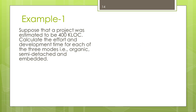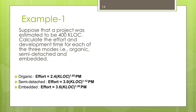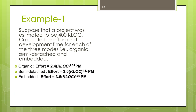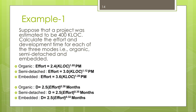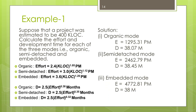With the help of this example we can understand how to use the COCOMO model for finding the effort and development time. First, find the expressions for effort and development time for all modes. These are the effort expressions for all modes and these are the development time equations for all modes. Pause the slide, put 400 in place of KLOC, find the effort, then substitute that effort value into the development time equation to find the development time in months. These are the answers — match your answers with these.